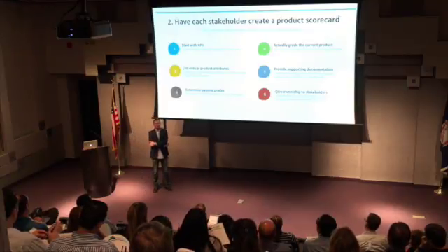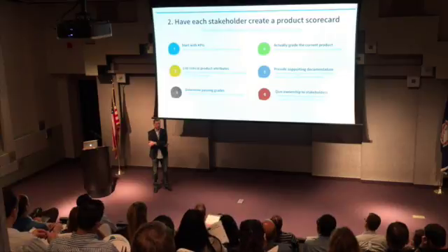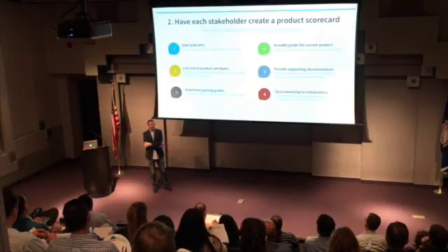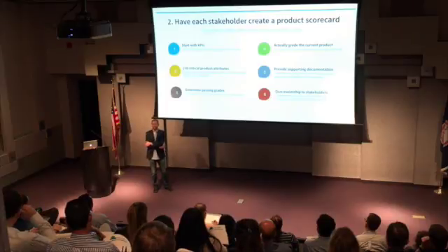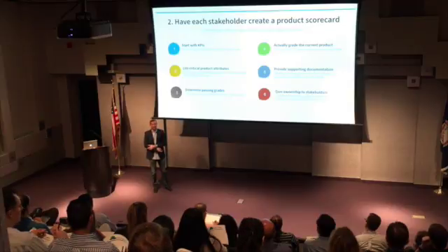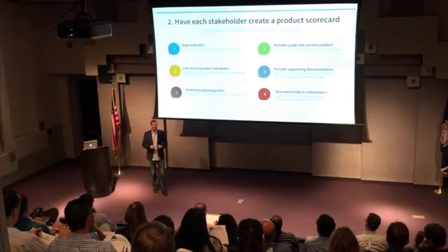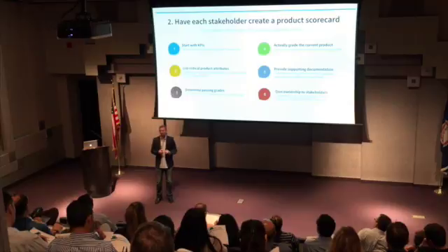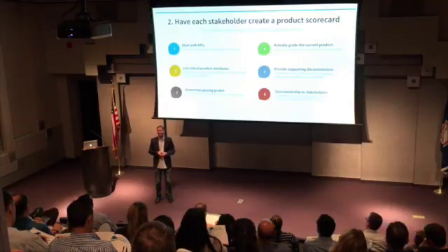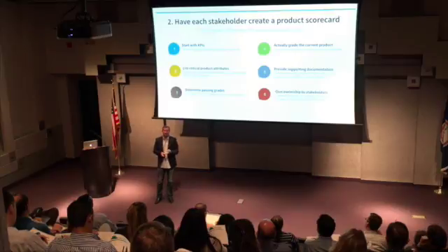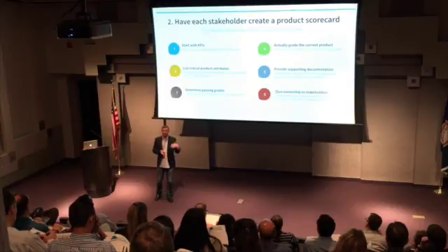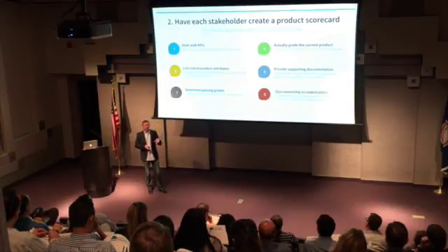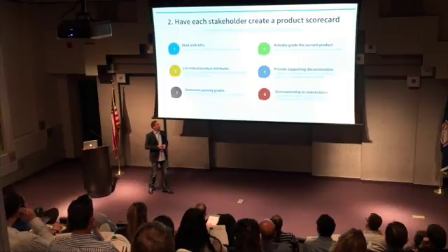It doesn't need to be an A+ at every level. What does it really need to be, right? So if you're doing, let's say, a consumer application, security is important. Nobody wants their data to just be distributed across the internet. But at the same time, the reason that consumers are buying your product and using your product is not because your security is superior A+ quality. It just needs to be good enough to get the job done, right? I don't need 128-bit encryption, and that's not going to be the way as a user that I'm going to judge whether I use your product or somebody else's product. It's a consumer app. I want to know it's engaging, it's fun to use, it's easy. Those are the kinds of things I care about most. So security maybe only needs to be like a C+, whereas usability needs to be an A, right?